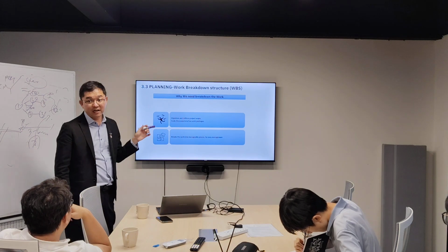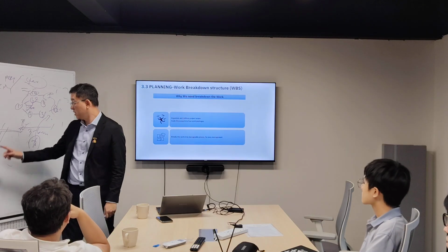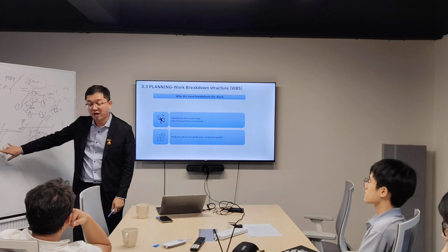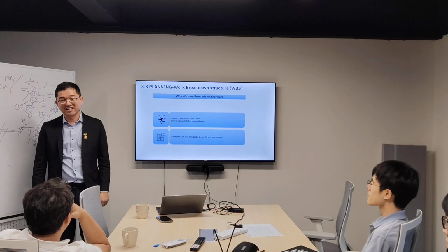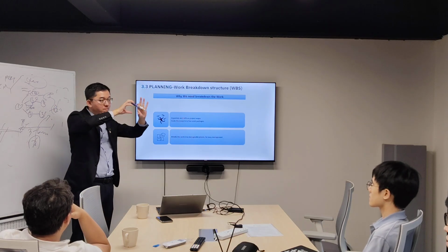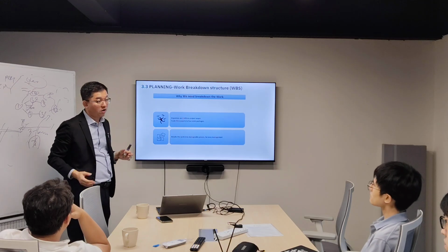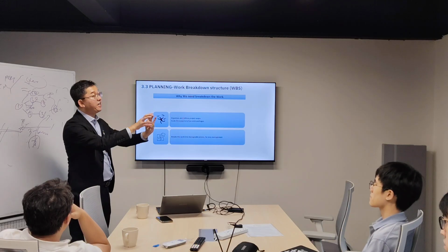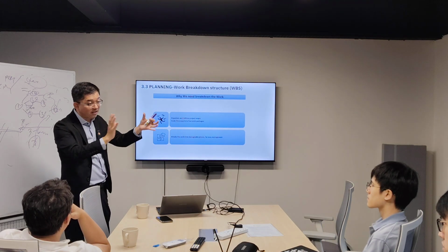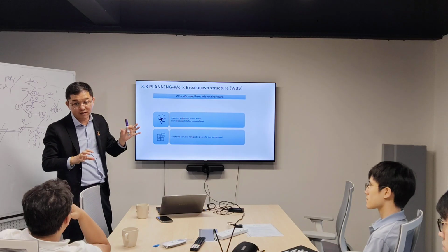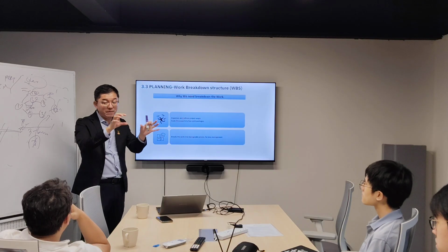And then we need to do the work breakdown structure. Okay? Why do we need to do the breakdown structure? That's why I said procurement is part of the breakdown structure. You need to consider it, or else you will forget. You will think that you have the one major item, I construct a column only, or I construct structure, I construct a wall. But I forgot to put in the M&E item. And then I would say my M&E item will be constructed after my structure is all done, architectural wall all closed, I only do my M&E work, right? But you forgot to consider procurement. So you need to put up another major item for procurement.